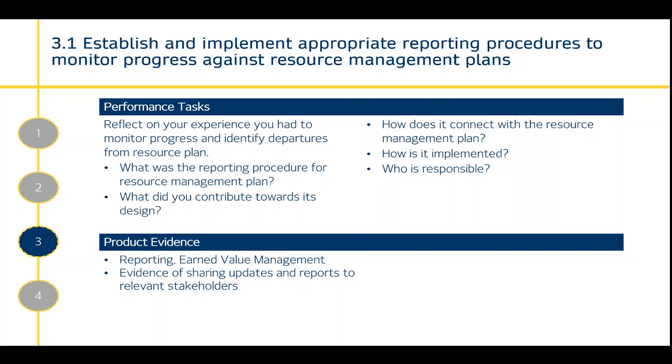If there's not enough resources being used, that could mean that your project is behind, so you maybe want to look at the schedule, or it could mean that the project has been delivered to a lower quality or a lower standard if resources haven't been used appropriately. For this, reflect on your experience where you've had to monitor progress and identify departures from the resource plan.